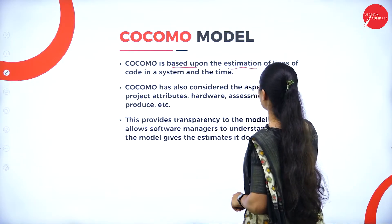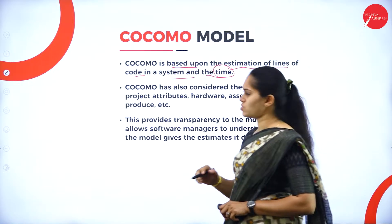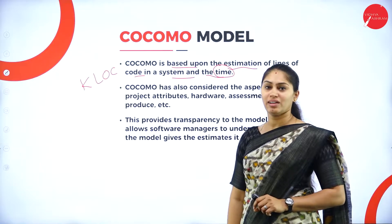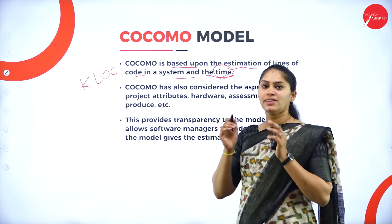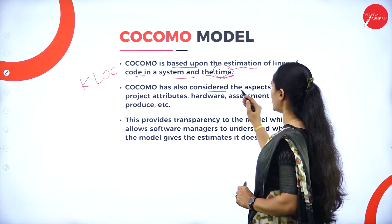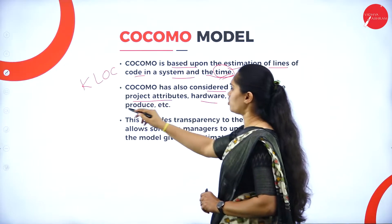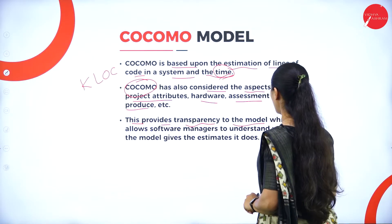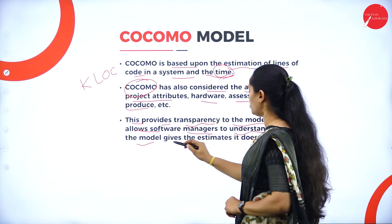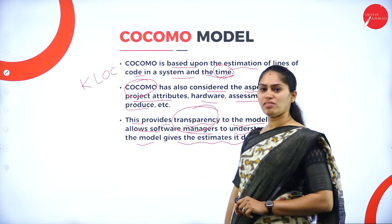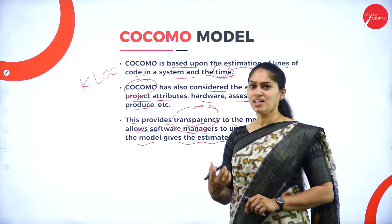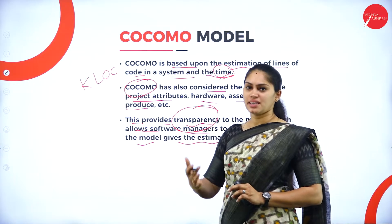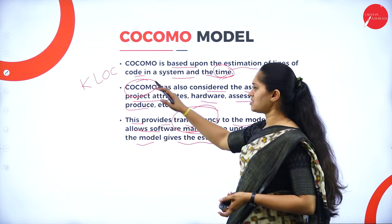In the COCOMO model, estimation will be based upon the lines of code in a system and the time. KLOC — that is 1000 lines of code — indicates how many thousands of lines of code we are taking to develop a particular project and what time it is taking. It also considers aspects like project attributes, hardware, and assessment of produce. This model provides transparency, which allows the software manager to understand why the model gives the estimate it does. Whatever functions are performed with the help of this COCOMO model, everything is visible to the software manager. Projects are categorized into three types in the COCOMO model.